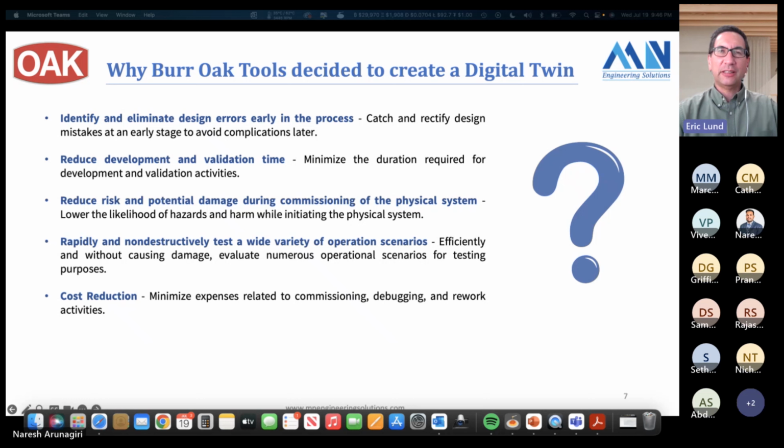And to tighten up the project schedule, we decided to utilize a digital twin to do virtual commissioning of the machine, hoping above everything to save some time so we could get the machine out and delivered to our customer. And obviously, we're hoping to, as Narisha talked about, do a lot of our software testing during the machine assembling and machining of parts phase of the project.